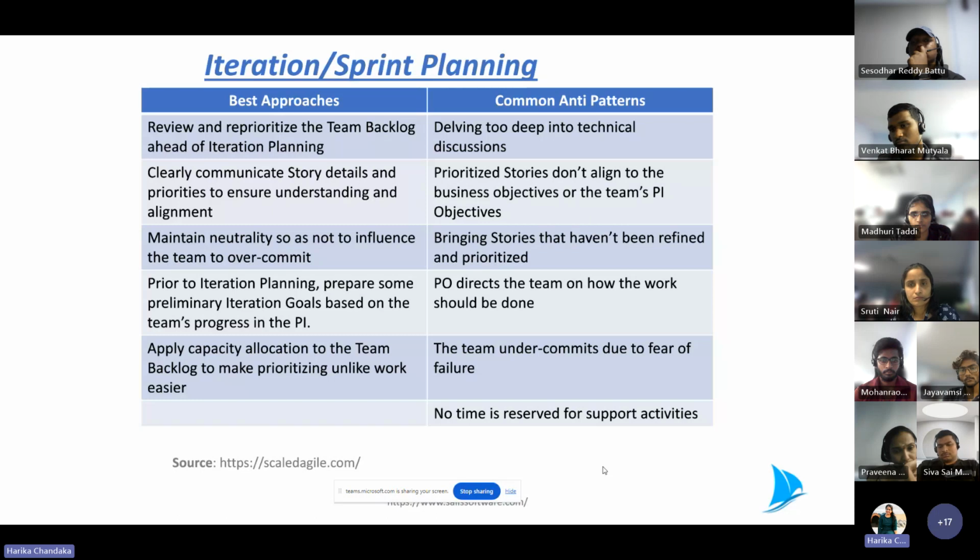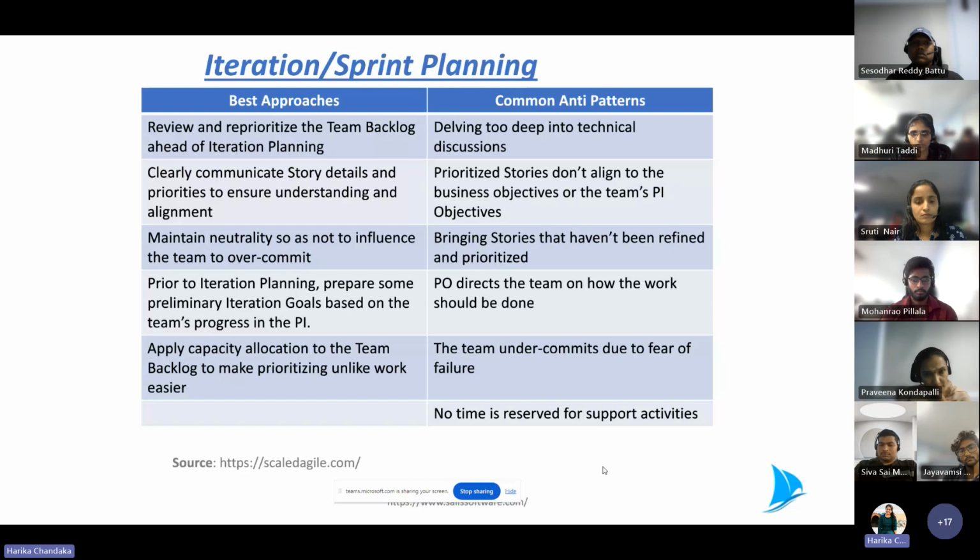Ideally, in our project, we have something called a production churn ticket. It's like a placeholder story. It will not be assigned to anyone, but we keep a separate effort of at least 5 story points for each sprint. In case some production support activity pops in, we may not anticipate a few of the maintenance activities, right? They may come into place. In such cases, we always use the production support ticket, which is a churn ticket. So instead of adding stories in the middle of the sprint, we always have this buffer ticket. We may even have bugs in place, so that is how we accommodate the support activities.